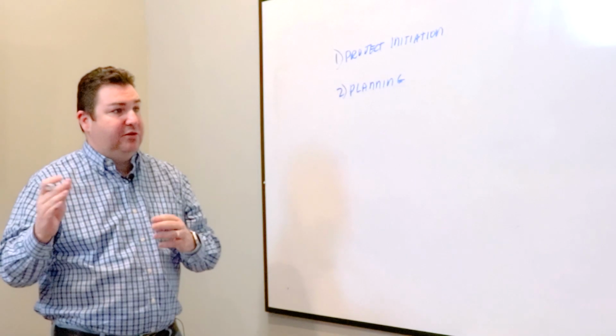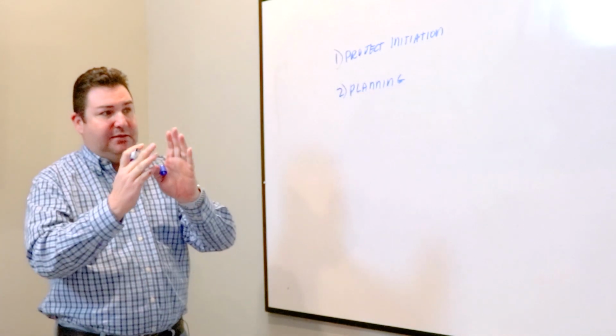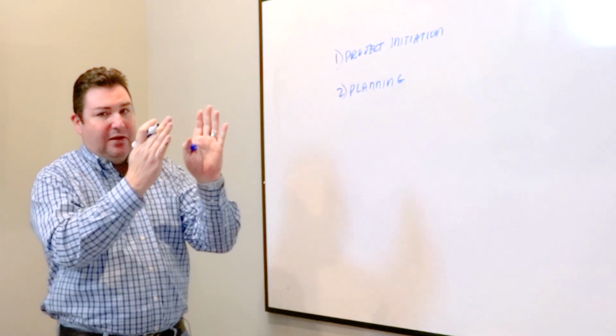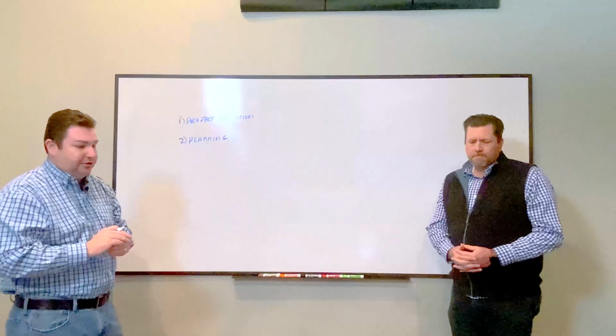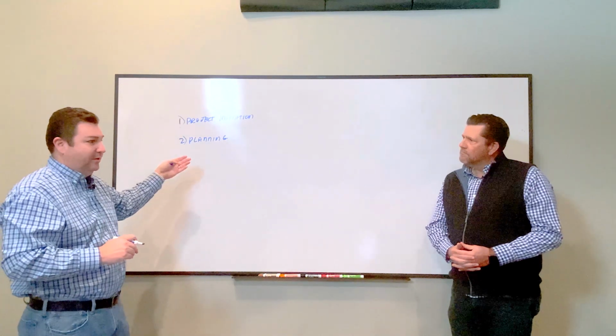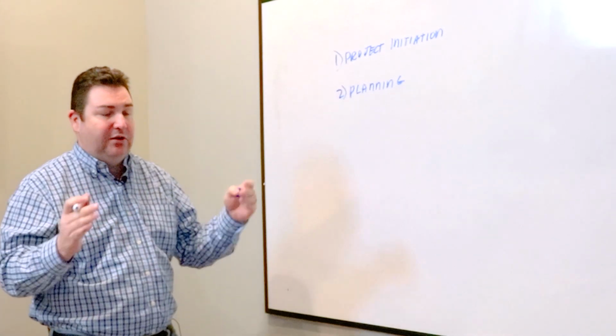Establish that detailed schedule and your detailed timeline, because you really start putting tasks together with their dependencies and say this task starts next week and it's completed in 2 days, and immediately following that task we can start the next one. You start to introduce some risk planning because you're starting to understand more about the project and where the risks are introduced. And then finally you're developing some QA and QC procedures.